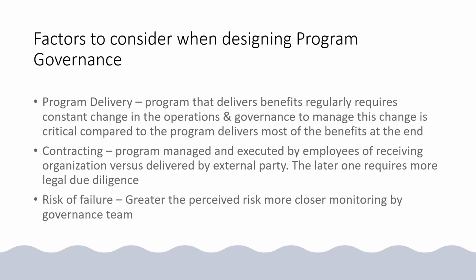Then the contracting, right? The program is managed and executed by employees of the receiving organization versus delivered by an external party, right? According to the contracting, the policies will change. If the program is executed by an external party, you need more legal due diligence actually. When the internal organization does it, you may not need that kind of due diligence. Accordingly, you have to design your program governance, right?